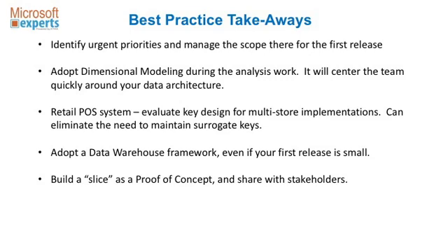We had those 4 facts and 20 reports, but fairly early in the project we created 2 reports, just on sales, and we showed how it could work and what the reports could look like. That's a great way to create some excitement. Even if you've done these projects before and you know you're headed on a good path, getting that out in front of people's hands early, being careful not to set expectations that they're looking at real data, or that they're expecting to run their business off of these early test reports. But getting them to see what's happening goes a long way in keeping support and excitement for the project.